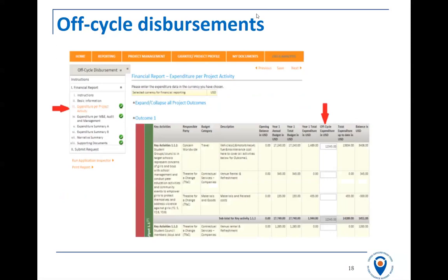So as I said, if you found this year, in year 1, that you don't spend 80% and you have to wait until October or November next year, and suddenly you've reached 80%, we would open up a new report and get you to complete your expenditure in a new report, and then we would be able to release the next tranche, as long as it wasn't 40 days before the next report is due.